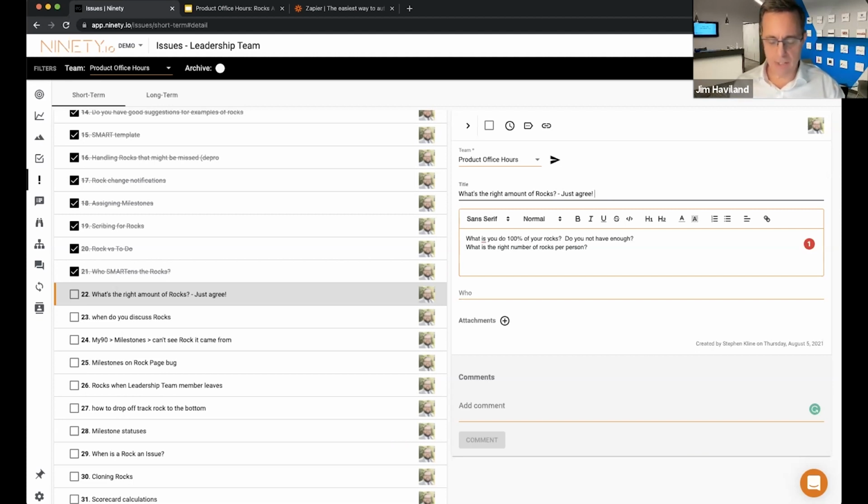Once we get into the quarterlies, I will hold back. Like I told you the story about Ron Kaminsky, a team he's been working with for a long time, but he recognized they weren't going to get all 4 of those rocks done. 3 was all they were going to pull off. So a talented coach can help you out with that. But 80% is about the right rock completion rate.